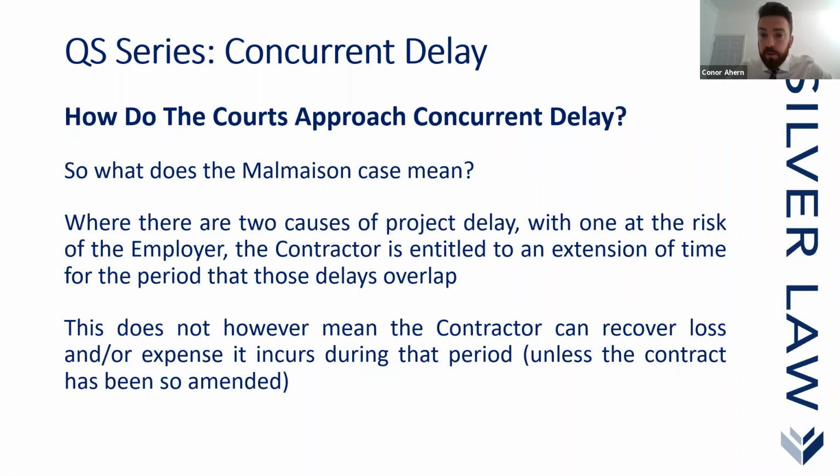Just bear in mind that just because there is a relevant event, it does not automatically become a relevant matter. Now, if you look at the standard forms, there is a large crossover between relevant events and relevant matters, but you've got to really look at what your contract actually says.